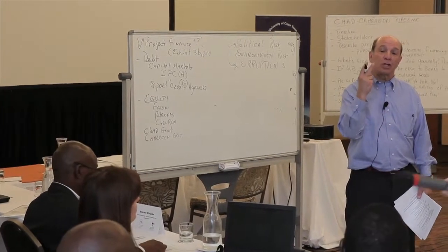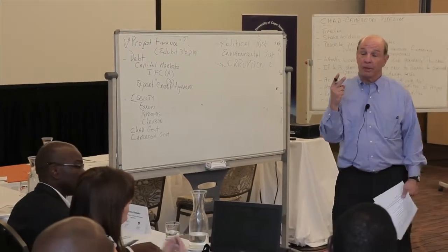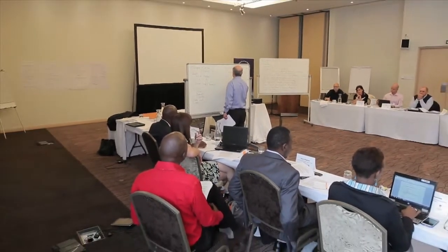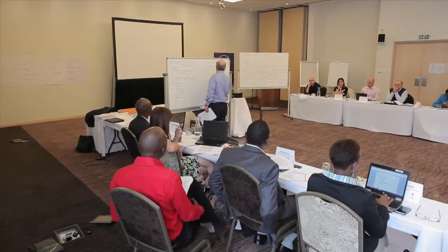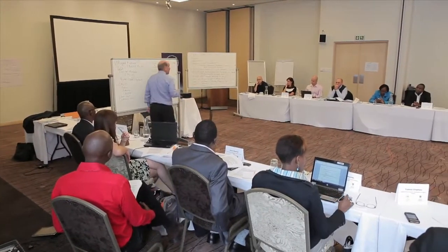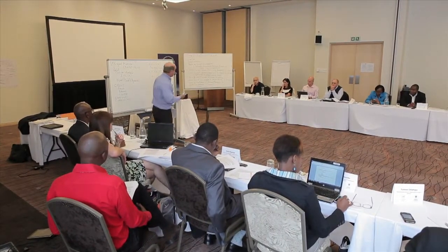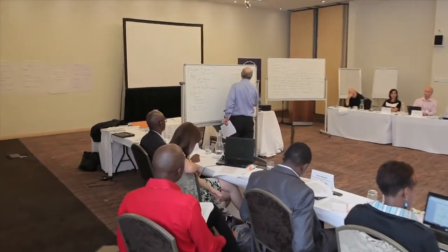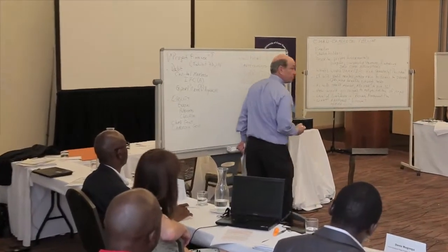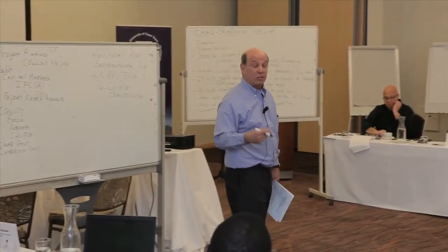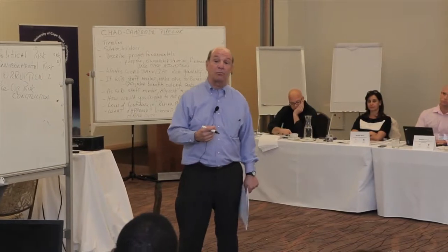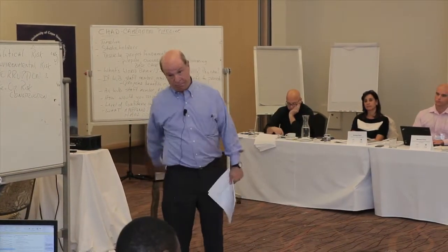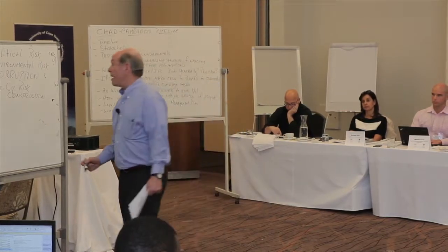There are basically two stages, if you want to simplify it. One is the pre-operating risk. And that is basically, is it ever going to get built? Construction. And with a big project like this, it's a lot of money, but it's also years. So we talk about risk in terms of, we have a large risk before revenue. And then we have operations.